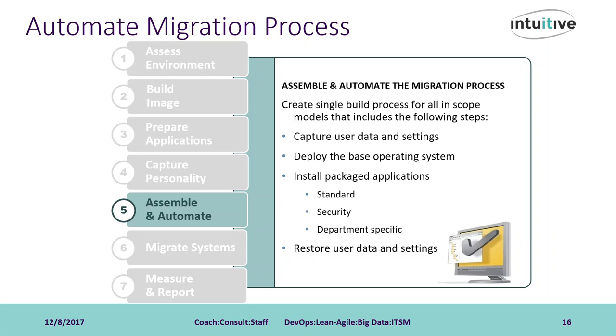I recommend at this point a build schedule, again, be created ahead of time. This schedule would list not only the target migration date and user sign-off of a completed system migration, but also an area where you would track the installation status of any hardware prerequisites, a listing of the software applications needed, as well as the details around user-specific data capture requirements for PC Transplant.